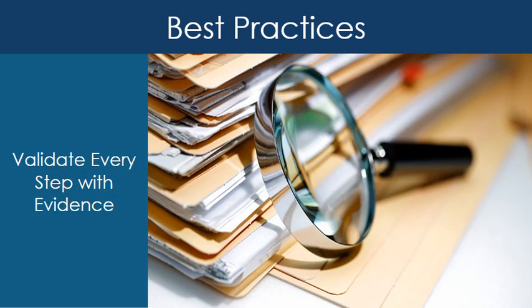Validate every step with evidence. Your analysis is only as good as your evidence. Logs, timestamps, records, metrics, documentation, and direct observations all count. "I think" or "it seems like" do not count. If you can't verify an answer, pause and investigate. Building a causal chain on assumptions is like building a house on sand.